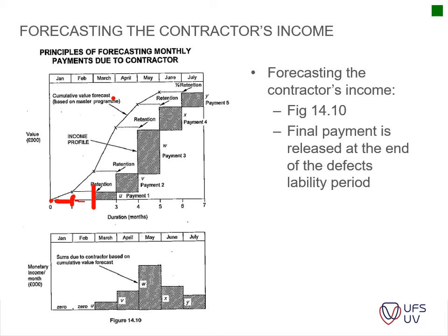And then you continue with your work, so your cash flow continues to be an outflow, and then only after the second month you get your first payment. Okay, and then you put in your second claim, and that claim you only receive in month 3. Okay, and so forth. So you can see it's also on the previous month's work that you've done. So there's a continuous deficit that you have as you go along. Okay, then monetary income. This is just a bar graph of the above.